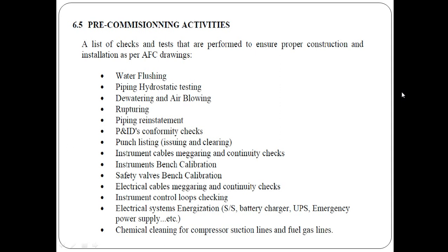Here we have the pre-commissioning activities as listed, starting from water flushing until chemical cleaning. All of this list is included in the pre-commissioning activities, and it shall all be done.